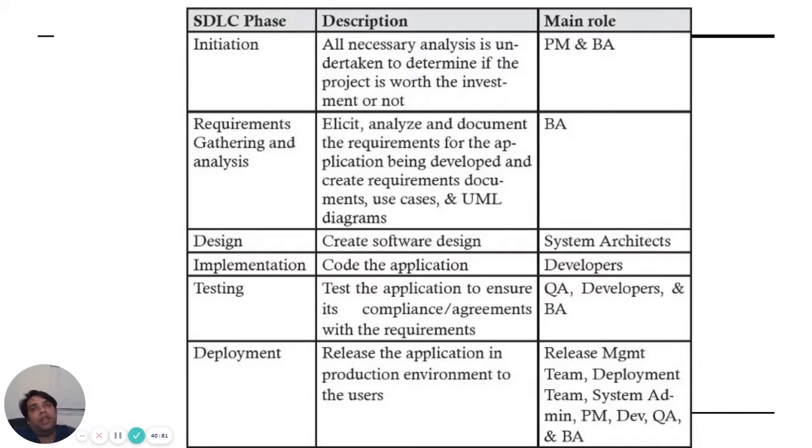So whenever they develop any project or some plant, suppose let's take an example of a milk plant. Let's talk about Amul. So Amul has developed some pipeline. It is going to supply some milk or butter or something in the pipeline. So what happens once they build it? They will do a dry run. They will not put butter right away. They will put water or something, and they will check whether they can find any leakage anywhere.